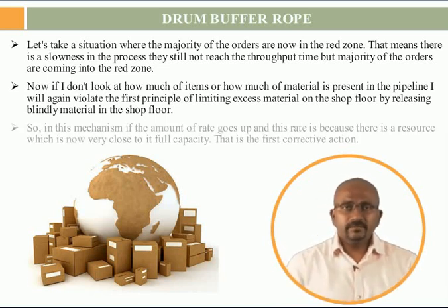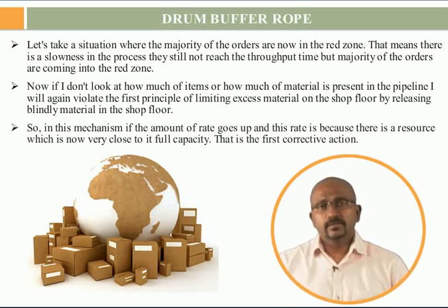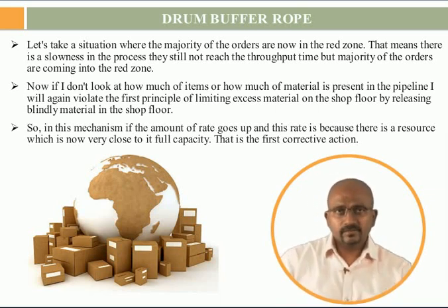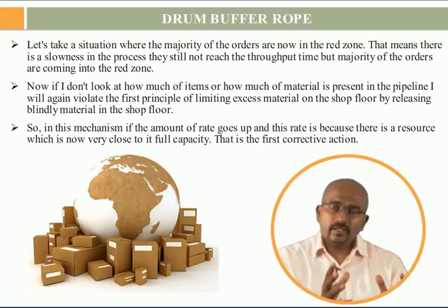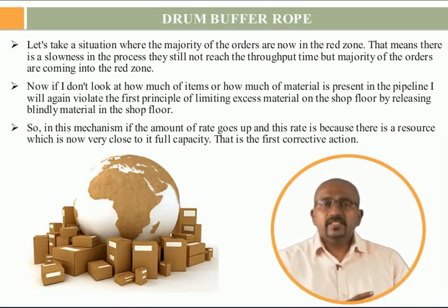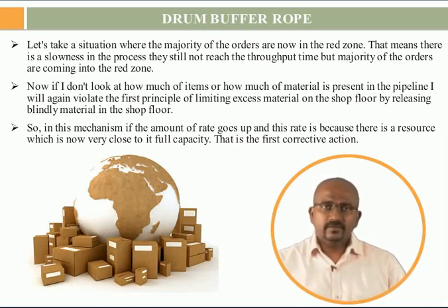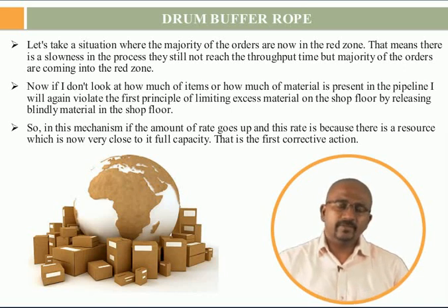So in this mechanism, if the amount of red goes up, and this red is because there is a resource which is now very close to its full capacity, the release gets tweaked. We immediately add more time buffer and increase the time buffer.